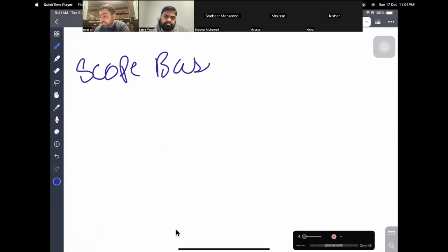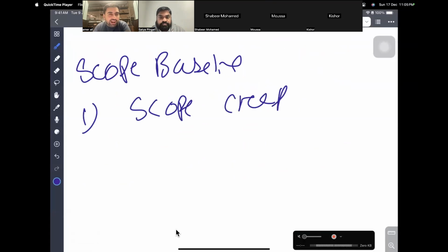Now you cannot change this baseline. If you want to update it, you need to raise a change request. If a client tries to add something without going through the proper control procedure, that is called scope creep. And if you add anything more than that, that is called gold plating. Okay,